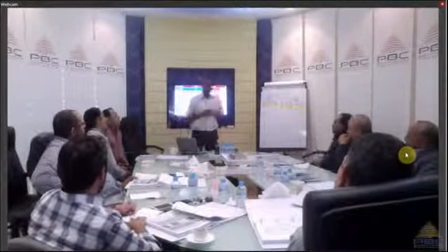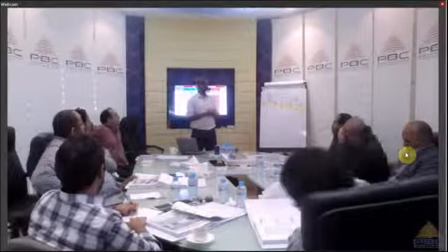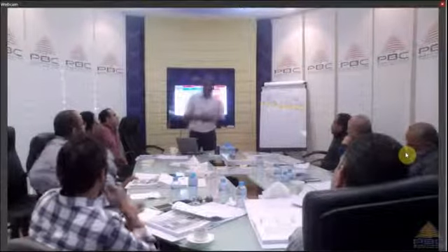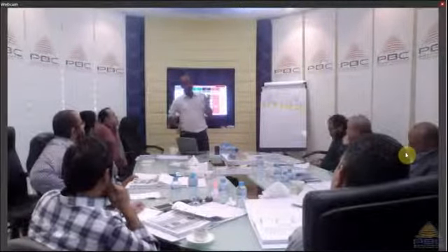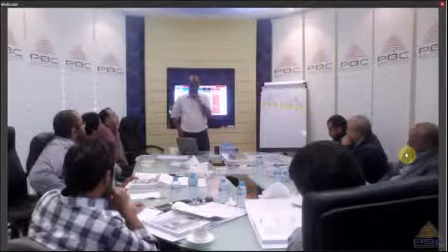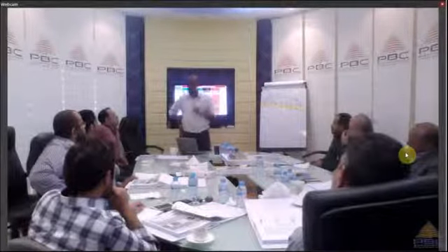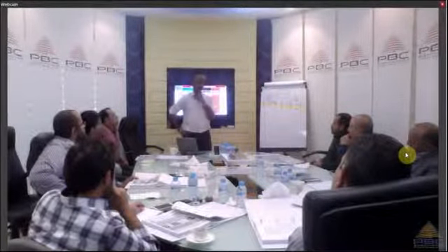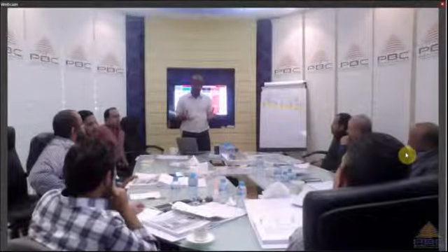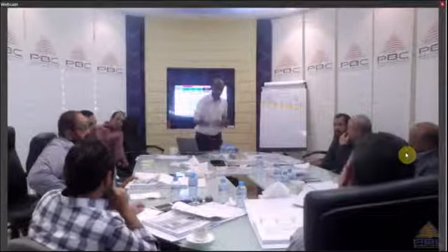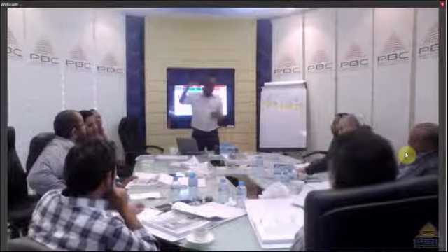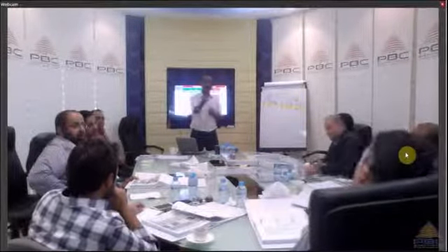Why? So let's say he said, oh, it will take about 4 hours to paint the room. So the painter comes in and says, well, you know what? The paint you need for this room is a special type of paint, and to order that paint we need 3 weeks. So how long will the task take? 3 weeks. From experience. Yes. I don't know what the specs are, what type of paint it is. Exactly.